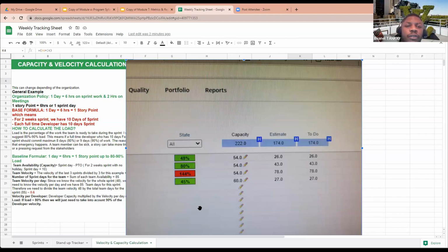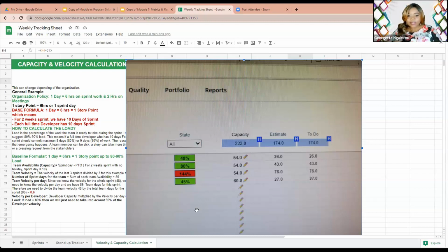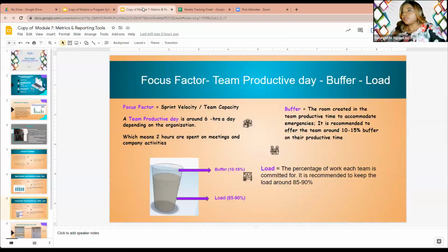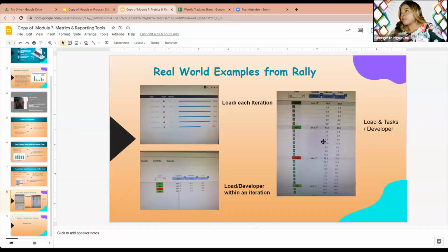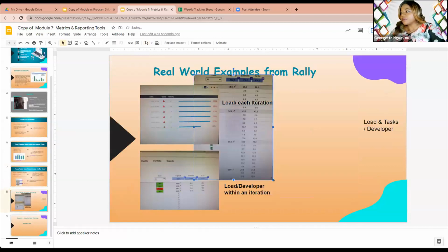Okay. And the 10 to 15% is up to your discretion, and it is determined by the behavior of your team. Is that correct? Really, it's determined by the team, because they are the ones picking the story. During the planning, you will say, Mr. A, do you want to take this story? Then they say, okay, I'm going with this story. And then when they create a task under their story, they put in the hours. Let me show you an example. Let me make this bigger for you to see.